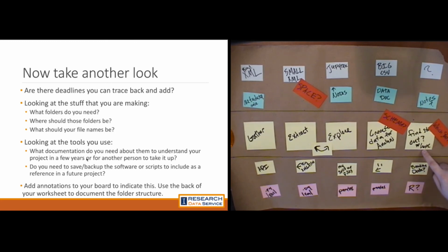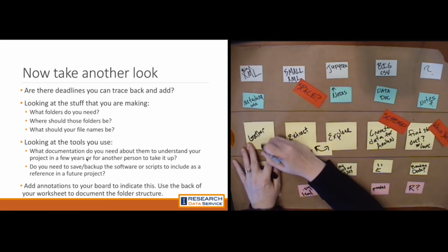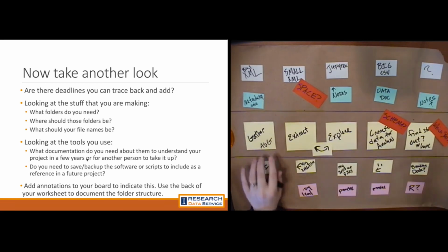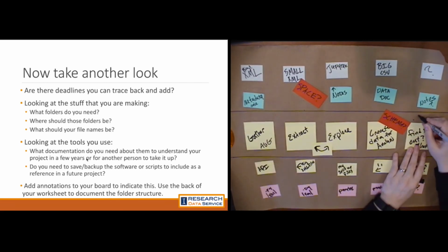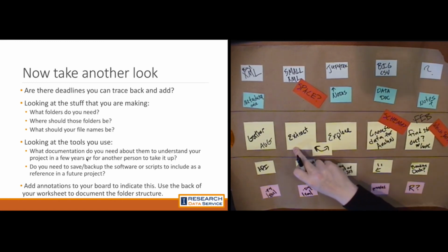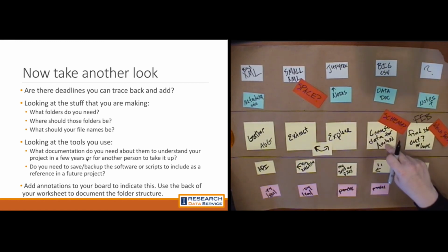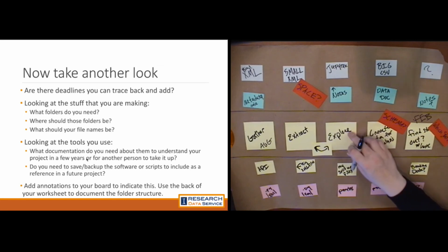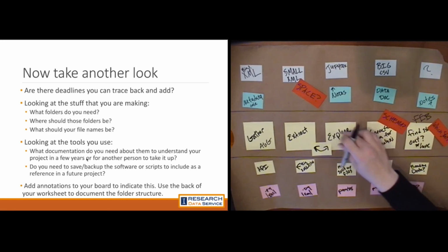And so if you say, I know this is going to happen in August here, and this needs to be February, then you can extrapolate which months these need to be due. So you say, okay, if I want this due at the beginning of January, that's probably not going to be happening because of the winter break and finals from the fall. So maybe I need to push this to be done in early December.